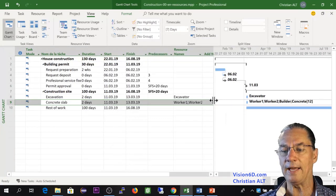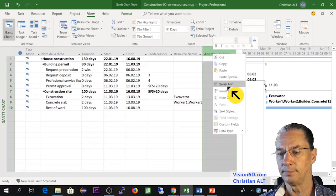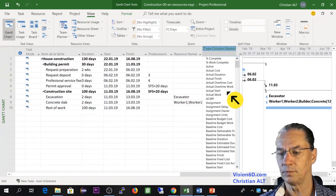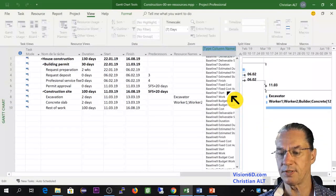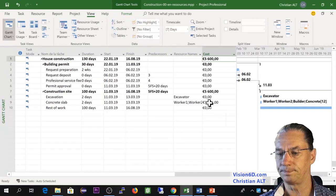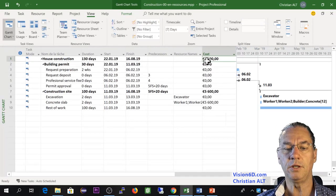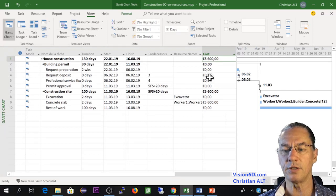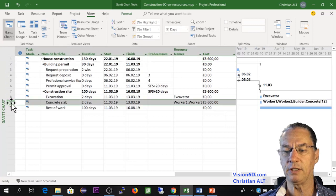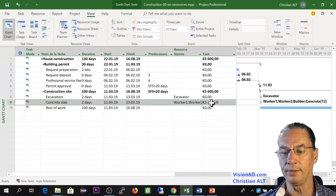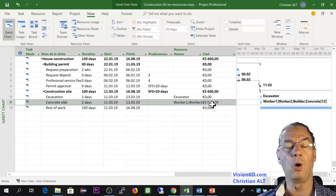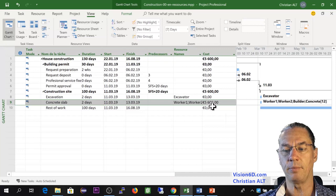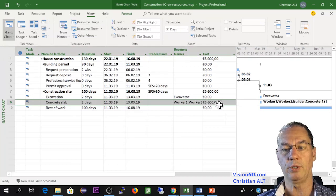The one that interests me, it's the one about cost. And you see here that Microsoft automatically calculated the cost of each task. And specifically talking about the concrete slab one, we saw that if we sum up all the costs that we had in the information, we'll come to those 5,600 euros.